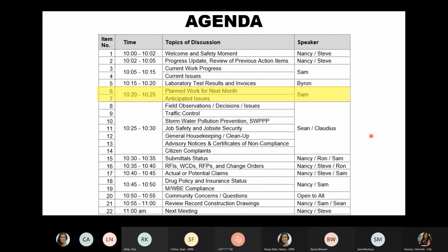All right, very good. What about the final wet connection that's near the freeway? That's on the east end. Once we install the section of line between right there in phase 6, then we can test and chlorinate. That'll be the 3rd exhibit. We'll test and chlorinate that, and then we can make the final tie-in. Okay, that'll be the last exhibit.